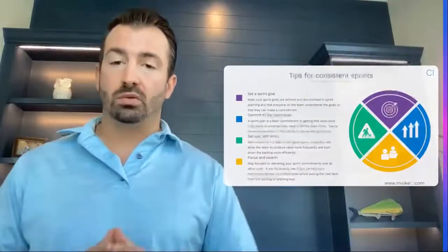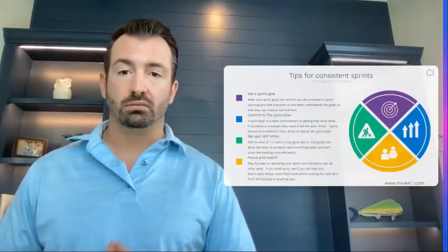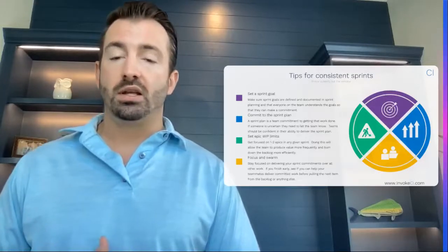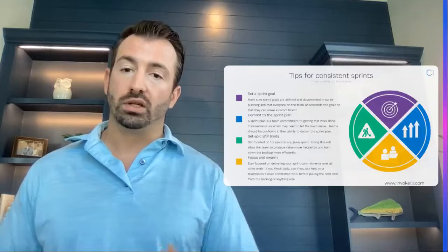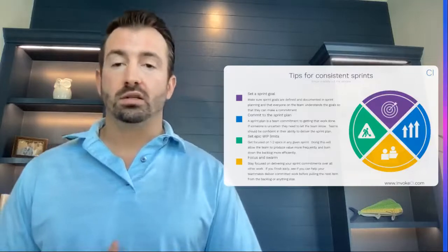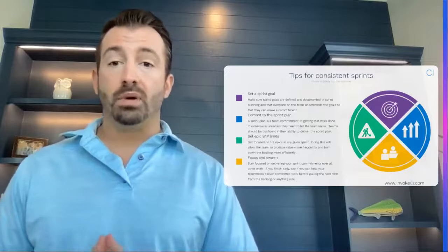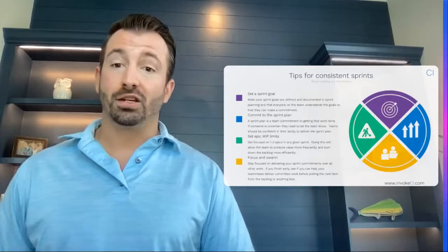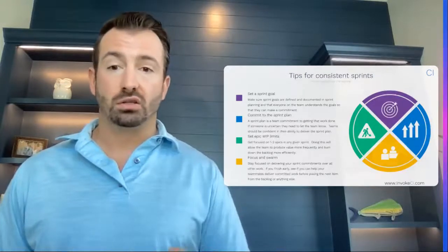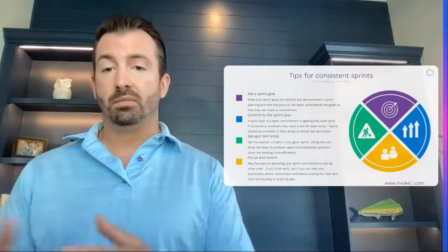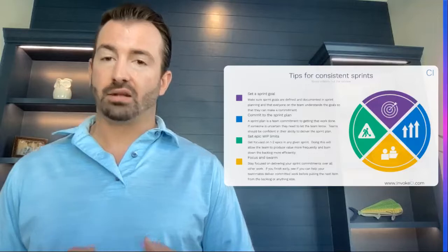Why is this important? Well, there's unplannable work that occurs and may impact your team on a day-to-day or sprint-to-sprint basis. And it's important that if you are pulling in that work, it's an active discussion so that you are making the right decision. And if you have to pivot, you can. But if you finish your work and there is still committed work in the backlog, make sure within the sprint that you are working on the sprint commitments before you start to pull things off of that backlog.